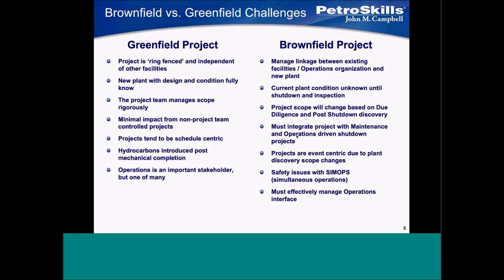So what does this do? It changes the project scope — and it changes the project scope at probably the worst possible time, when the unit is shut down and the work's to be done. You open something up and all of a sudden you don't have what you need. You must integrate the project with maintenance operations as they drive the schedule and control the resources.